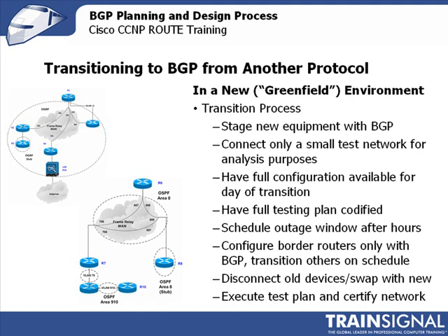You can connect a little test network from the LAN side in order to be able to do some analysis to some maybe temporary IP addresses, just to be able to verify things are working. Have the full configuration available for the day of transition. Make sure it's all spelled out. Schedule your outage window if you have that kind of a process at your company.